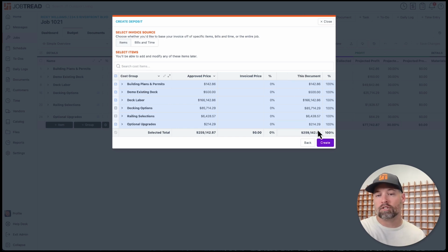In this case, it's our first invoice. So I could say, let's do a 40% draw. The nice thing about this is that the next time you send the second invoice, it's going to default to the remaining balance. So 60% of the job will be left. I can certainly take further draws from there, maybe collectively doing 5 draws over the course of the project. But this part, totally up to you and your typical invoicing process.